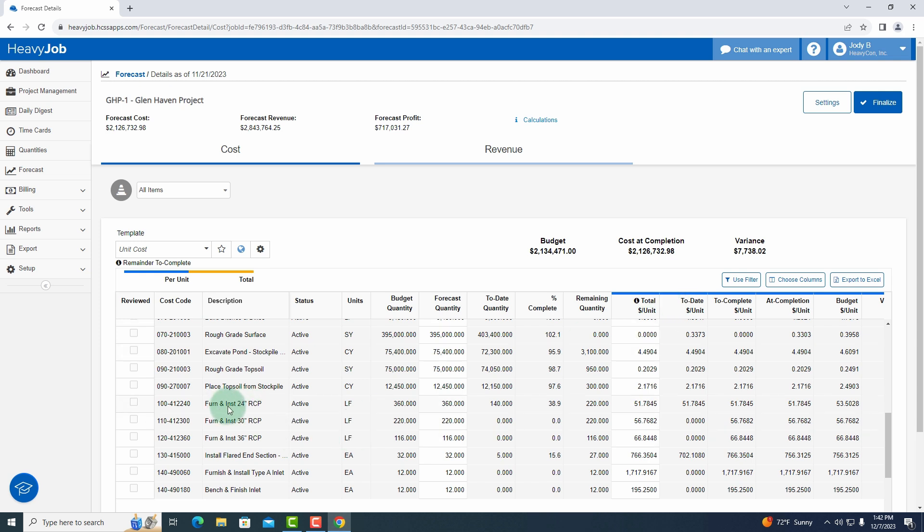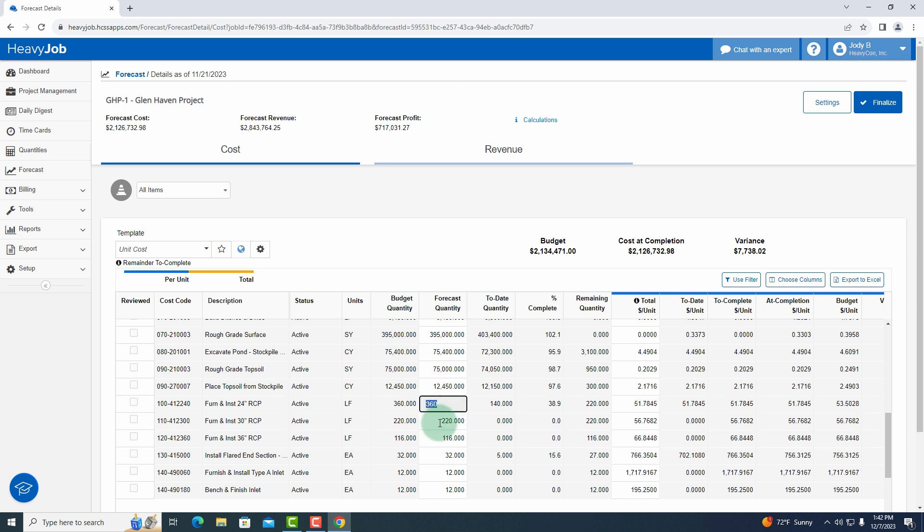Now I want to focus on this furnish and install 24 inch RCP. You can see that I have a budgeted quantity of 360 feet. My forecasting quantity is 360, so if I need to take that up or down I would adjust it here. You can see I can click in and make an adjustment that will say hey, to date from what's been completed on time cards or out in the field and been reported on time cards is 140, so now I have a remaining quantity of 220.